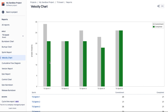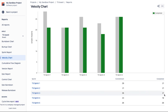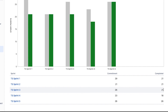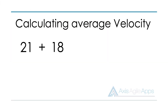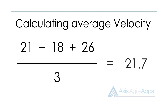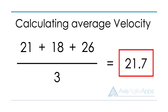The completed number of points — the green bar — is what we want to use to calculate velocity for sprint planning. What I like to do is keep it simple and take the average of the last three sprints. For this team, in sprint three they managed to get through 21 points, sprint four 18, sprint five 26. So I'd take 21 plus 18 plus 26 divided by three, which is somewhere around 22 points. That would be the average velocity we use for sprint planning to determine what they can get done in the upcoming sprint.